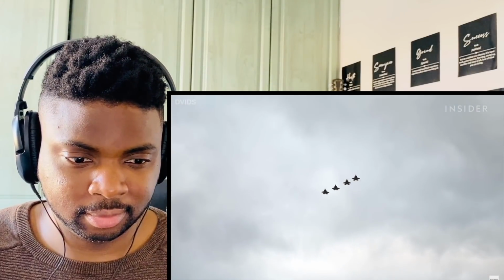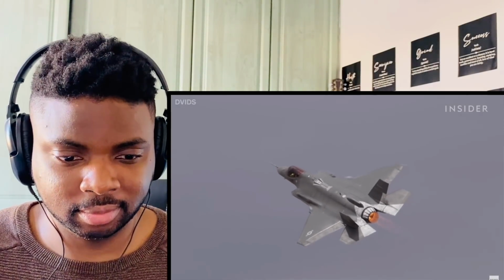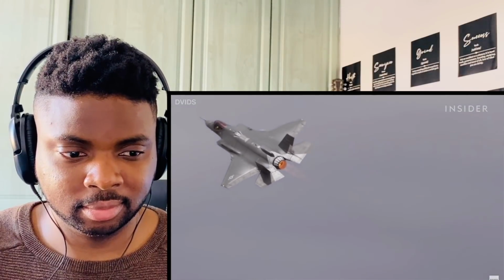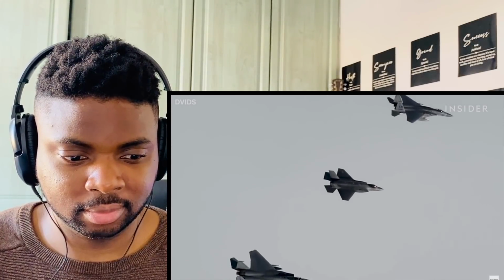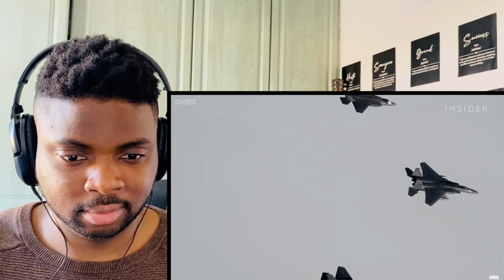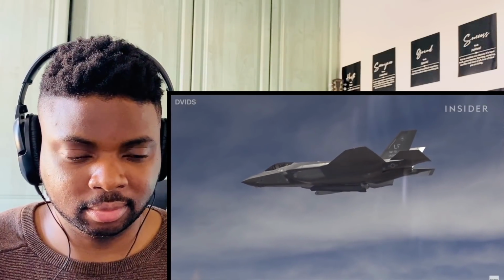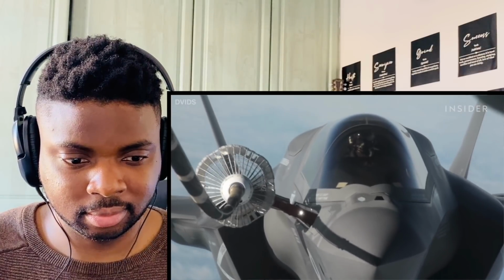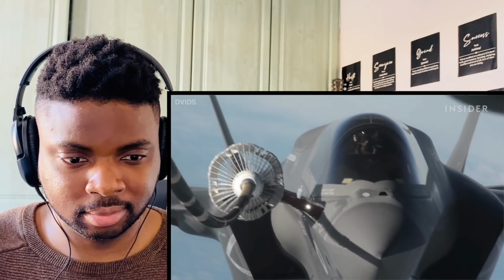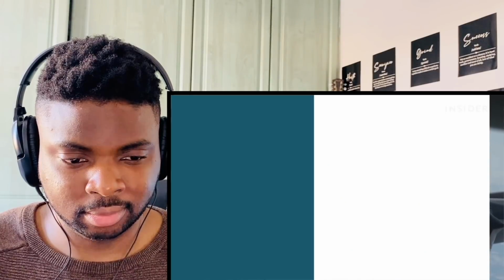It's just sort of out there. Since the military buys planes in batches, future production could stop at almost any time. But most likely that's not the case. Most likely they'll get maybe 11 or 1,200, in which case you have to keep a legacy force of fourth generation fighters that work with you and depend upon you, the F-35, as effectively the force that kicks down the door. So 2 decades into the program, with less than a third of the anticipated planes built, that $1.7 trillion number is just an educated guess.